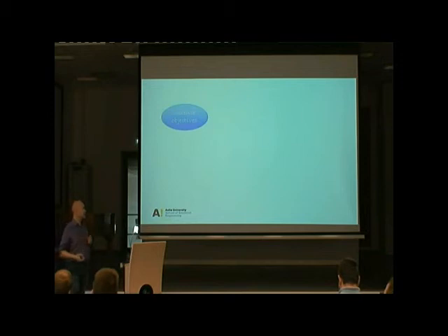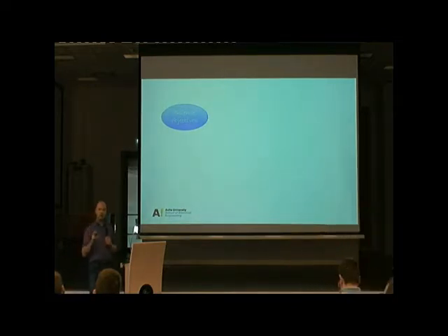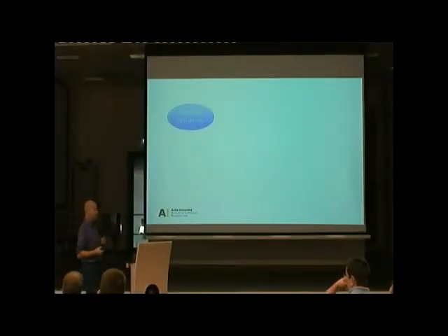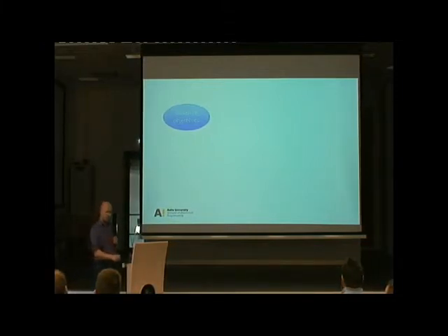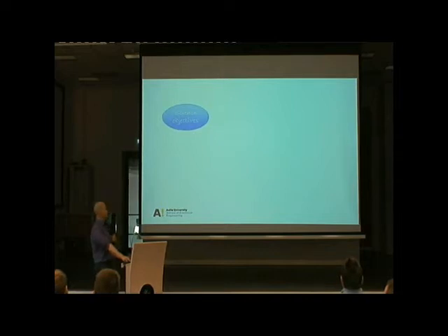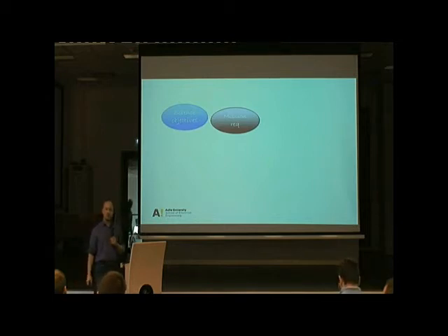A typical space project is designed in this way. First of all, you need to have your science objectives. First of all, you agree why you are building this mission. Is this science relevant, or mission relevant in a business sense? Space missions are also built just to show other nations that we are so cool that we can do a space mission. Anyhow, you need to have an objective, and this objective is actually driving the whole mission. First you agree on your objective, and then you derive from this objective your mission requirements.